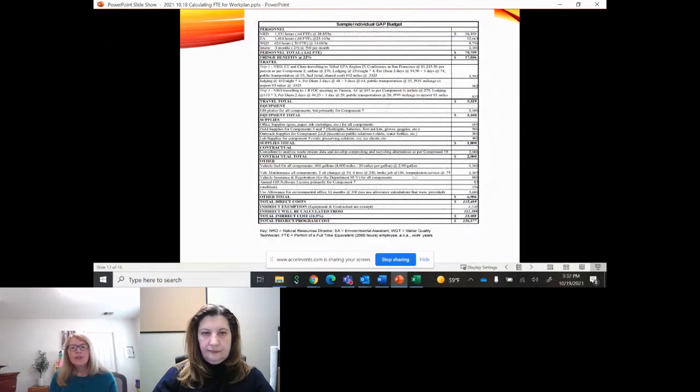And just to go back to how Tim was talking about developing your budget in the video, all of those costs feed into developing your detailed budget that you need to submit with your work plan and your application. So here's where you itemize, I'm sorry if this print is small, your hours for the director, the assistant, the technician, and your project officer might say, well, how'd you come up with those hours? That seems really high. You have all that calculation already done in your cost calculator.